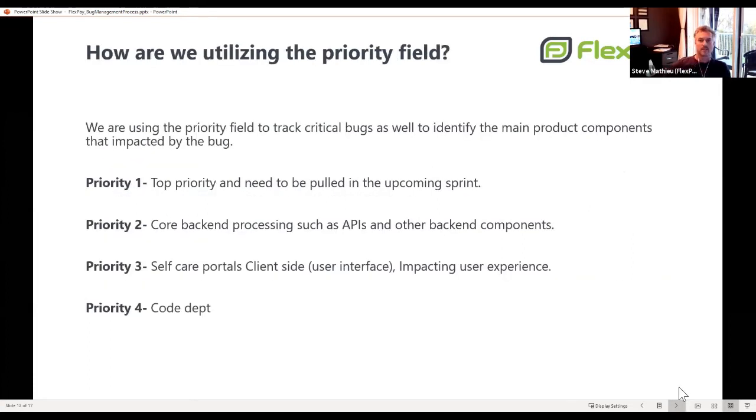The priority fields. In Azure DevOps, you have two of them. The one that we're using is the priority. Most of the users that we have don't really know how to set the priority. What does it mean? Because the prioritization is not really clear for them. It's too vague. So for us, we make it precise, something that clearly defines what it is. So one, it's not critical. You don't have to stop for it. But for the next sprint, the Scrum Master knows that he has to add that bug to the upcoming sprint. It cannot wait, but it's not urgent, so put it right after.